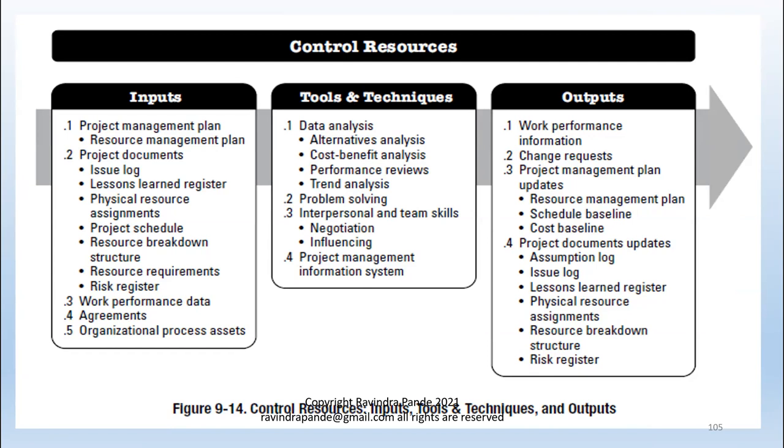And then we have trend analysis. This type of trend analysis helps us understand if we are doing okay, whether the project is in green, yellow, or red. If the project is going into the yellow, then even I might require help from the senior management, either releasing some cost from the management buffer or extra resources, because these additional change requests or challenges came our way.